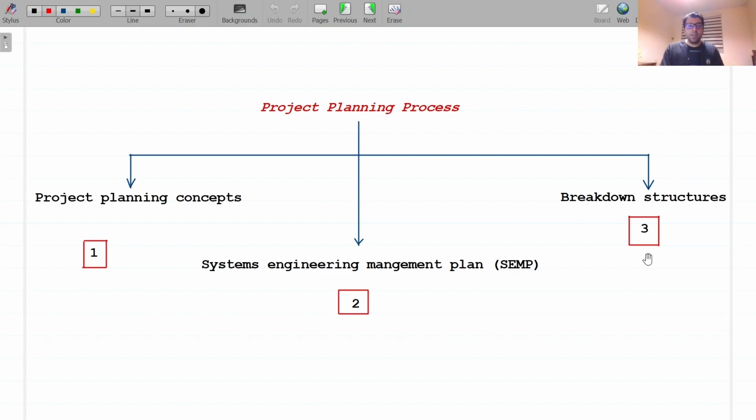The WBS includes all activities needed to develop the product. Each branch of the WBS is used to define a work package or WP. Each WP describes the work to be performed, related input and output, who is doing the work, the related interfaces with other WPs, the related cost and deliverables, and the key dates and milestones.